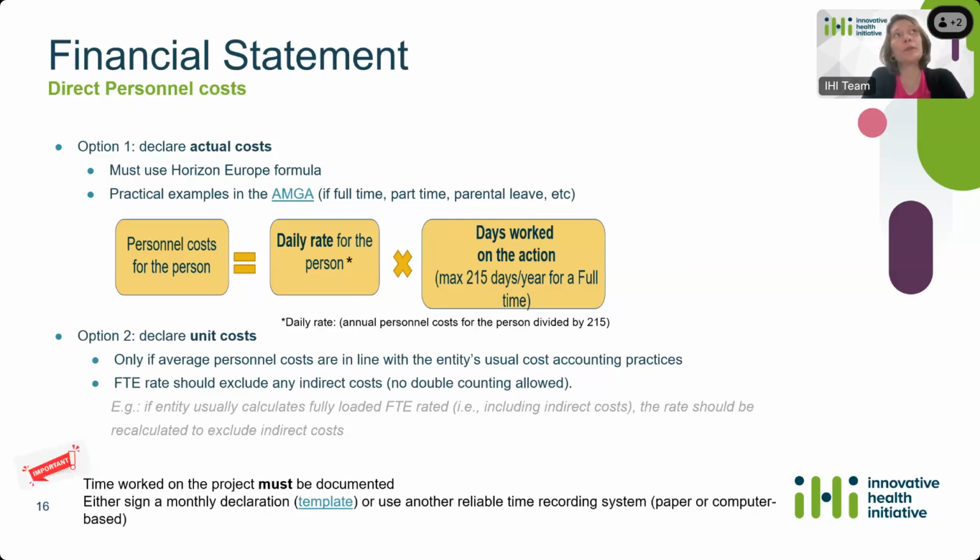Another important element regarding the personnel costs is that the time worked on the project must be documented. Either you can sign a monthly declaration, and you have the template here.